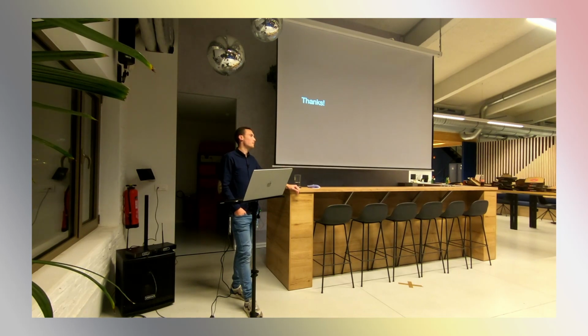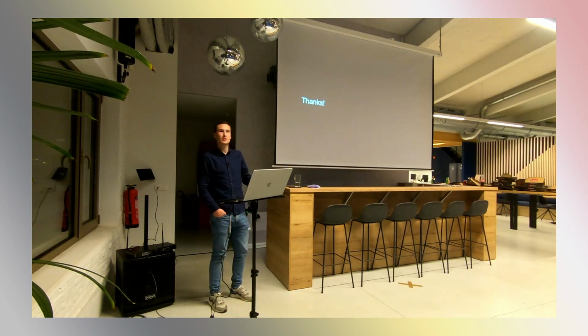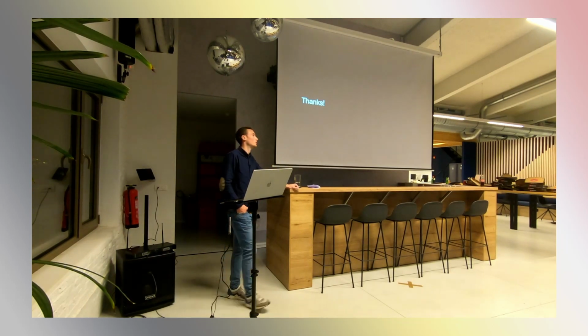Is there a maximum amount of story points you would give a story and then say, okay, now it's too big? Yeah, we try to keep them until 13, so we use Fibonacci. And if it's more than 13, we split them into 2 or more if needed, and if it's needed, we do a spike. Meaning we try to take 1 or 2 days to start already proof of concepting or try to build it to see where we're going to get.